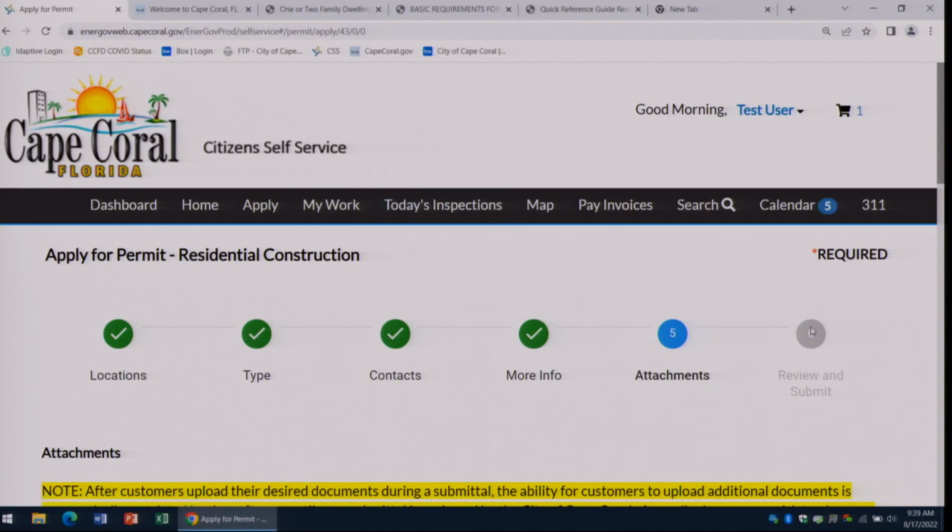All right, so before we go on, a couple of other things about how the single-family home process works. So permitting will receive your application. We'll go through all of your documents, make sure you have everything that you need to have in there. We make sure the addresses match on every single document to the address you're actually applying for. We look to see if the seals are there. And we're pretty much looking to see that, hey, are your impervious calculations on your plans, or did you submit them separately? If you're missing any kind of file, let's say we can't find your impervious, we reject your permit, we send you an email back saying, hey, you're missing your impervious, please upload.